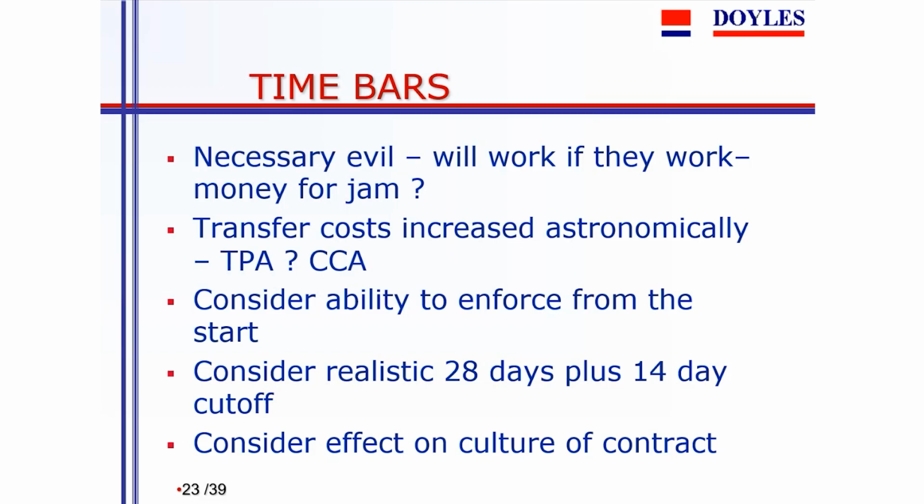That is that if you make it so you've got to notify within 3 days, it means that the contractor has to serve notices of claim every 3 days, and it soon becomes an unnecessary burden for the principal and his staff in administering them, and it has a deleterious effect on the contractor because he's got to go around thinking of claims all the time rather than getting on with the job in hand.